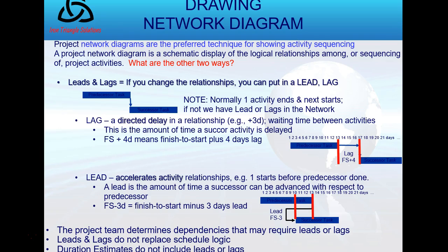Well, the best practice is to pave the whole road, let it cool for a day, and then paint it. I'm making this up. I'm not a construction expert, but this is how the logic works. But engineering says it's possible to start painting without any damage to the road or the paint qualities. It's possible to paint 4 hours after we're done paving.